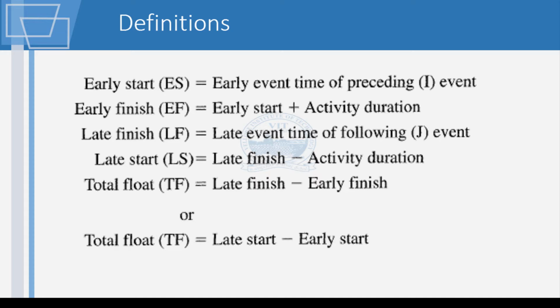So basically early start is nothing but the time when the previous event gets over, the earliest we can start, right? For instance, this lecture cannot start before 5 o'clock. Before 5 o'clock there is no chance that this can start because the previous lecture was going on. So for instance, before the excavation, there is no way that a foundation can start. Okay, so that is how we get this early start coming into the picture.